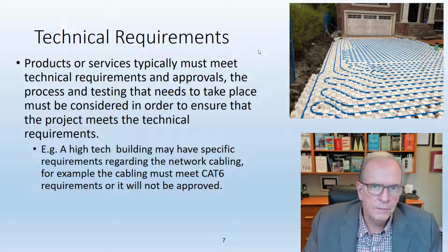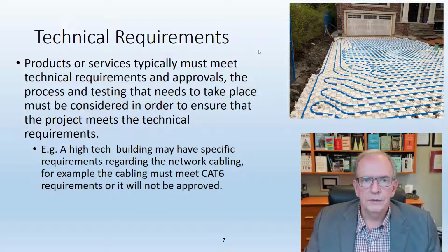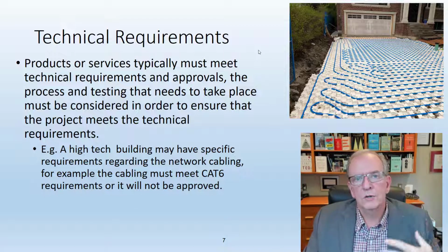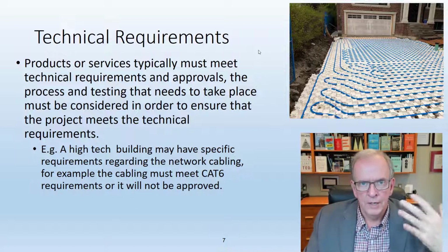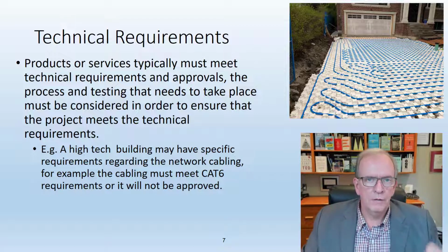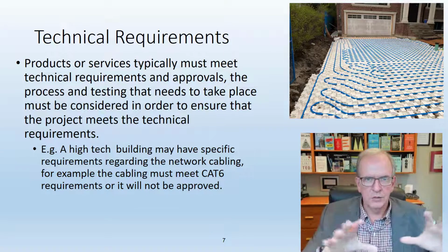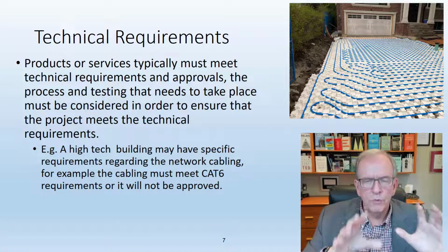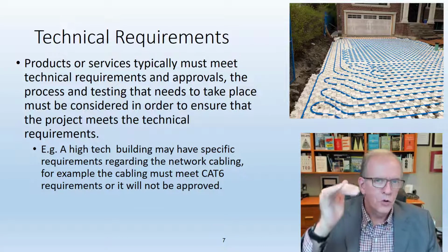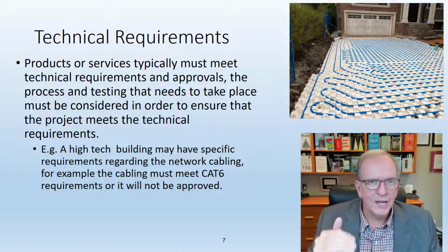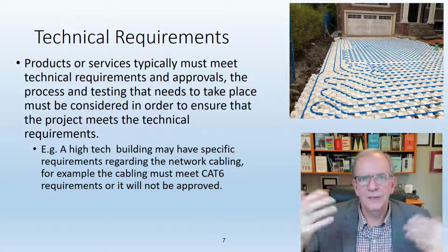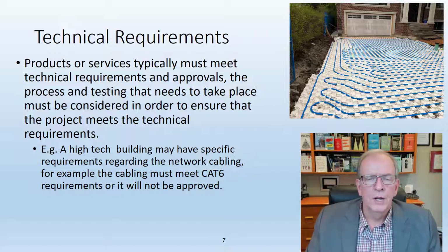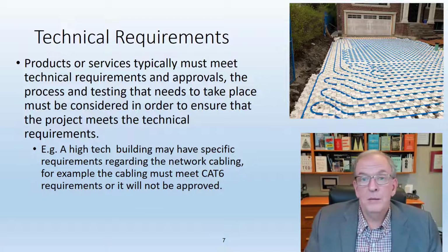Maybe it's a LEED building and a LEED certified building, and you haven't done a LEED certified building before. So maybe meeting those requirements, that's going to require a lot of time and effort to ensure that that goes well. So you're really at the get-go establishing these pinch points and trying to work out that this is going to require some extra effort, and we've got to make sure that we don't miss this or don't procrastinate it so that it catches up on us and then it ends up delaying the project or costing a lot more than we thought it would. And this is being proactive.